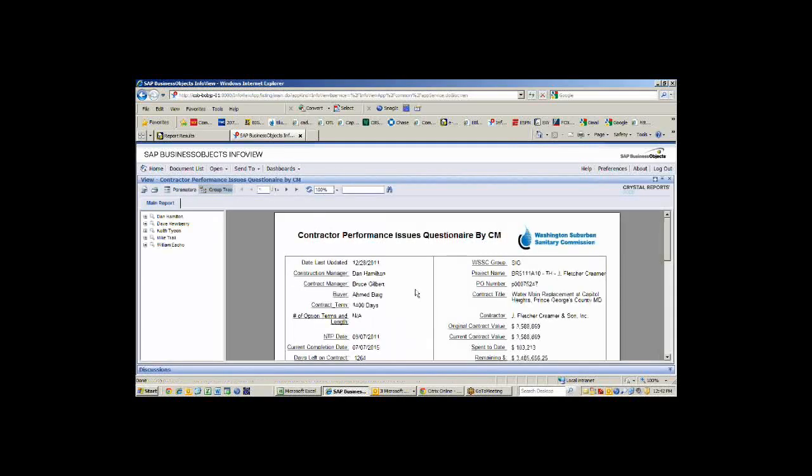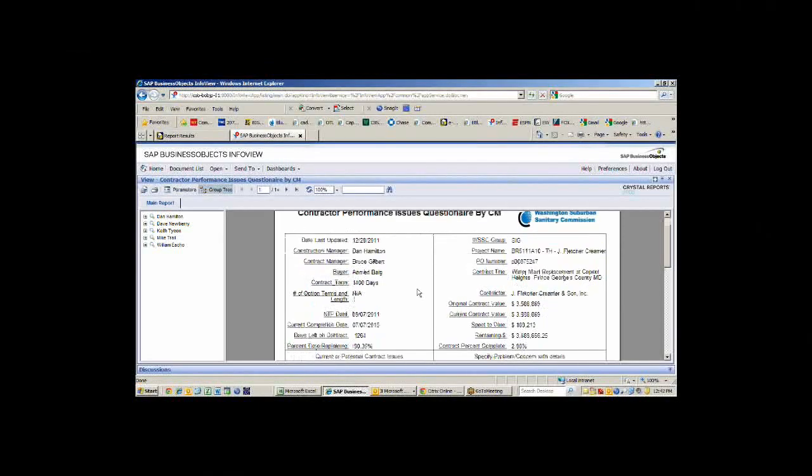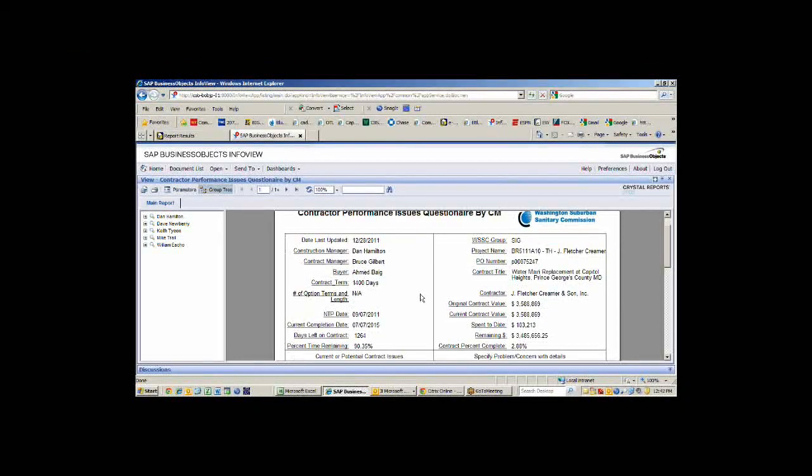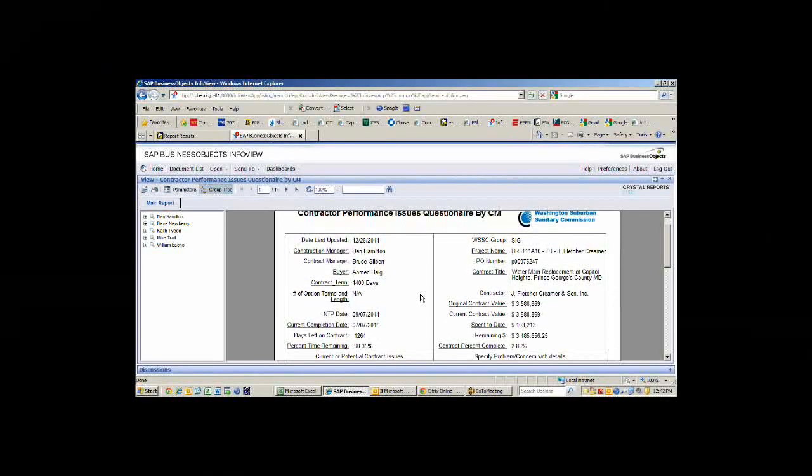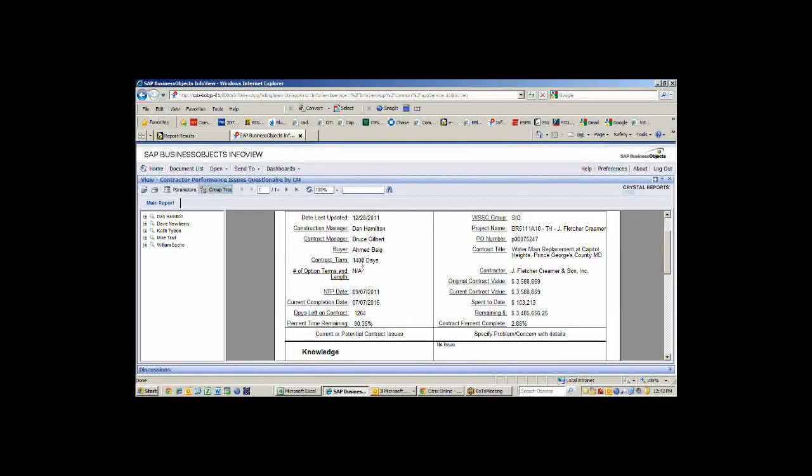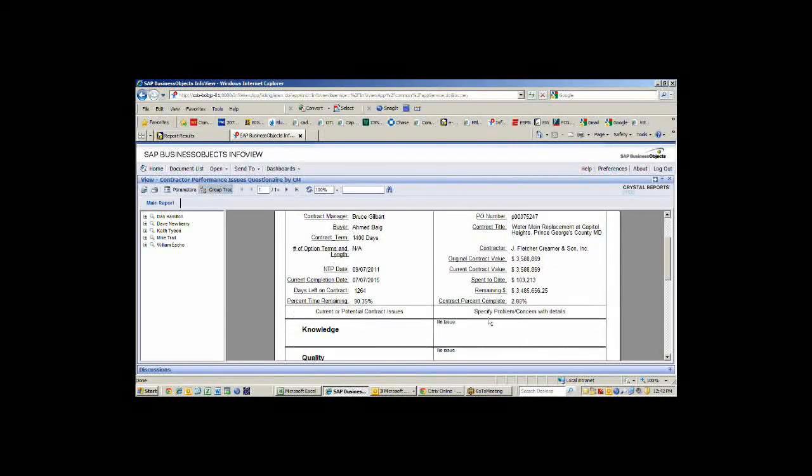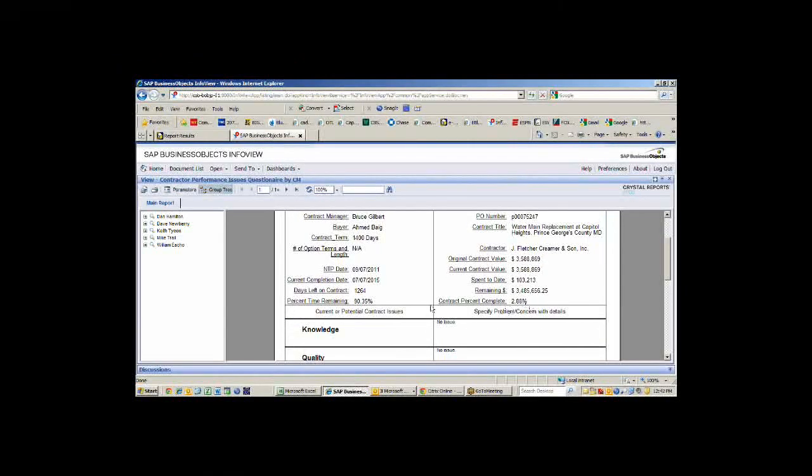We have our contract performance issue questionnaire, which is what our acquisitions people want to see. It's really just a summary of all those details that I had on the detail page. It shows you the construction manager, the contract manager, the term, the 1,400 days, when it started, when it's going to be complete, how many days are left, how much time is remaining, and how much money has been spent.